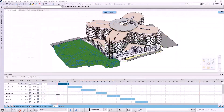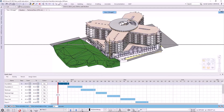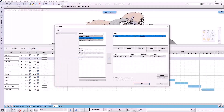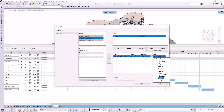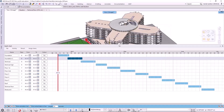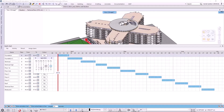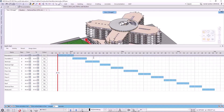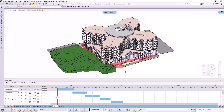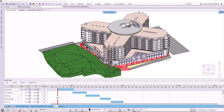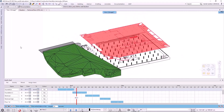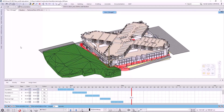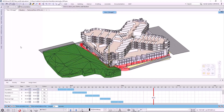Let's see what the construction animation looks like on a more complex model. We can see that we have already created the activities, filled them with periods, and added elements. We added the parking level elements to the foundation's second period with filters, for example. We can modify the periods at any time — we set the first period until the 16th, but if we change this, all periods will shift by those three days. Let's move the animation timeline back, set the date and line visibility on the animation timeline, move it to the beginning of the first period, and play the animation. We can see the levels appearing one after the other: the foundation, the parking levels, the upper levels, and their floors, walls, and openings are created one after the other in the animation.